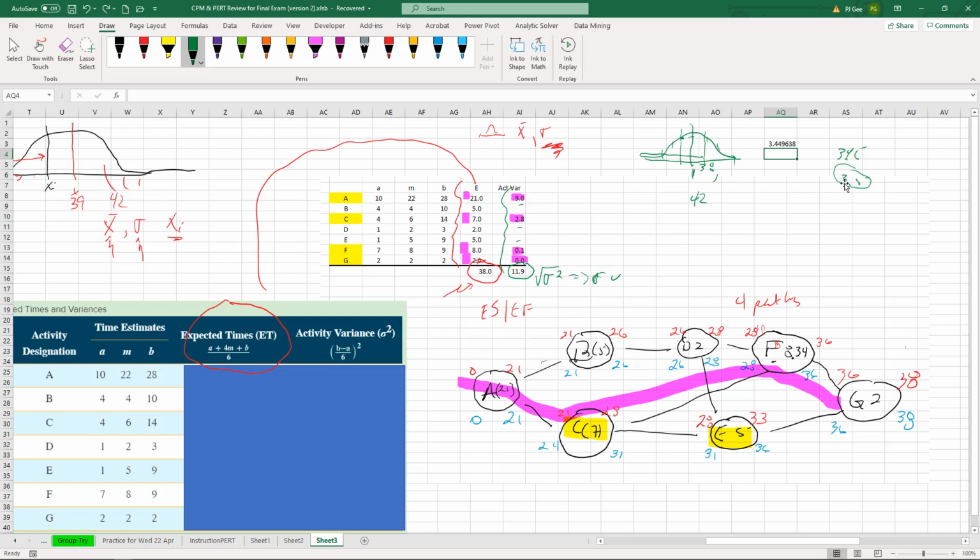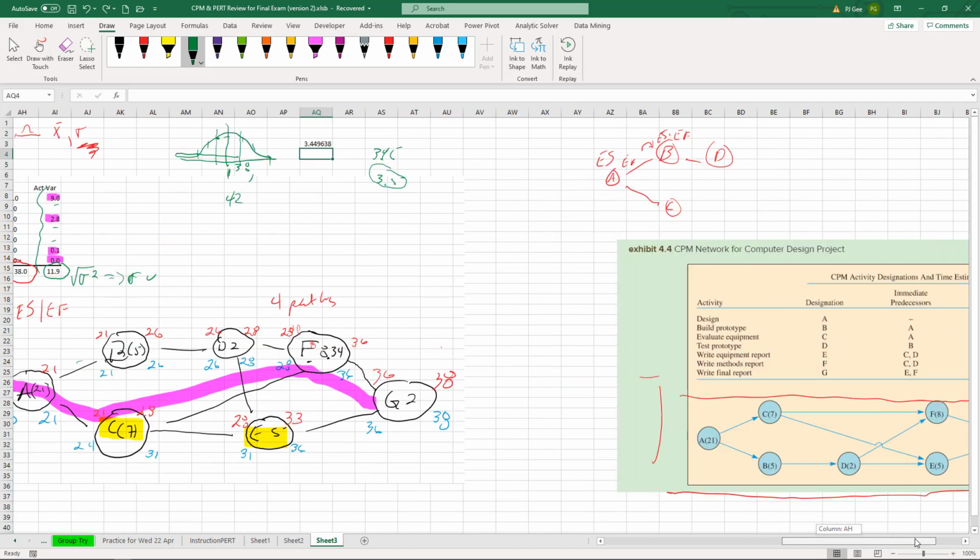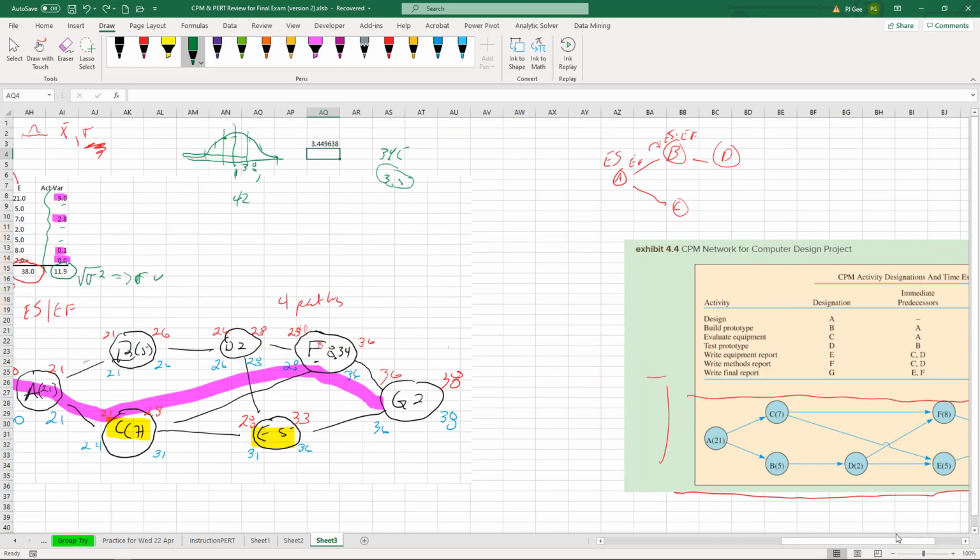Let's mark on our chart here. I suppose I have to draw a bigger chart. Darn it, I didn't want to have to get involved with this at this point. Okay, so I can just draw it here. You should be critically thinking the whole time through. We have 38. We want 42. What's our standard deviation? 3.5. So let's just take 3.5 and add it to 38.